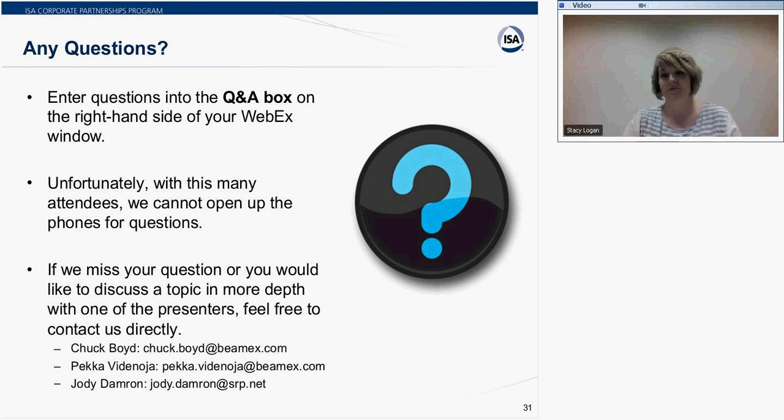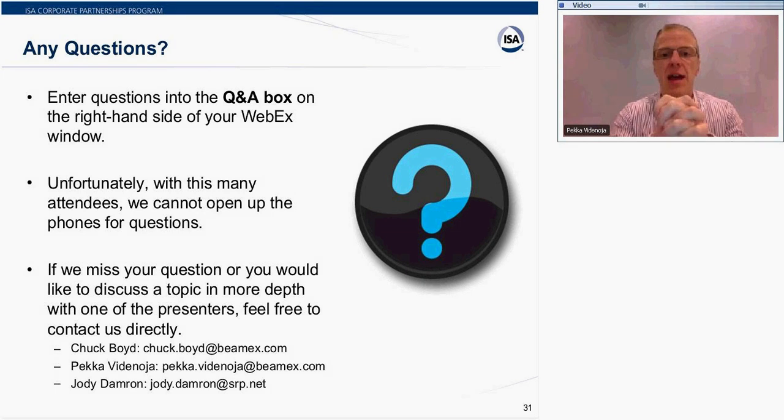Okay, at least I can answer that. There are different methods for how this can be managed. Of course we need to understand the data itself and the system. There are different places where the data can be validated. It can be validated in the phase when the data is collected and cleansed in the middle, or it can be validated when it is entered into the new system. So we also need to define the process for how the data validation is handled when it is moved from the legacy system to the new system.